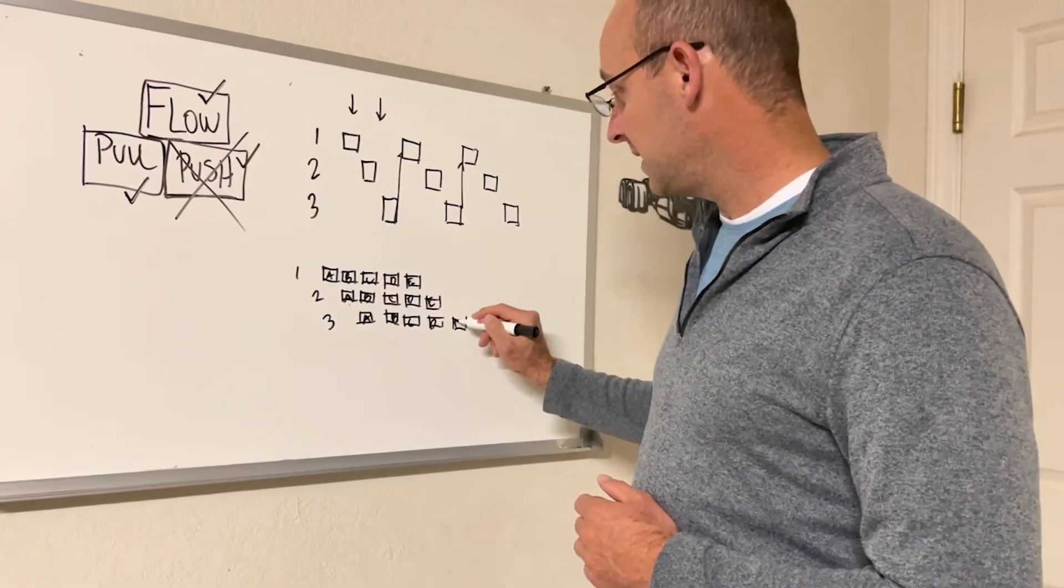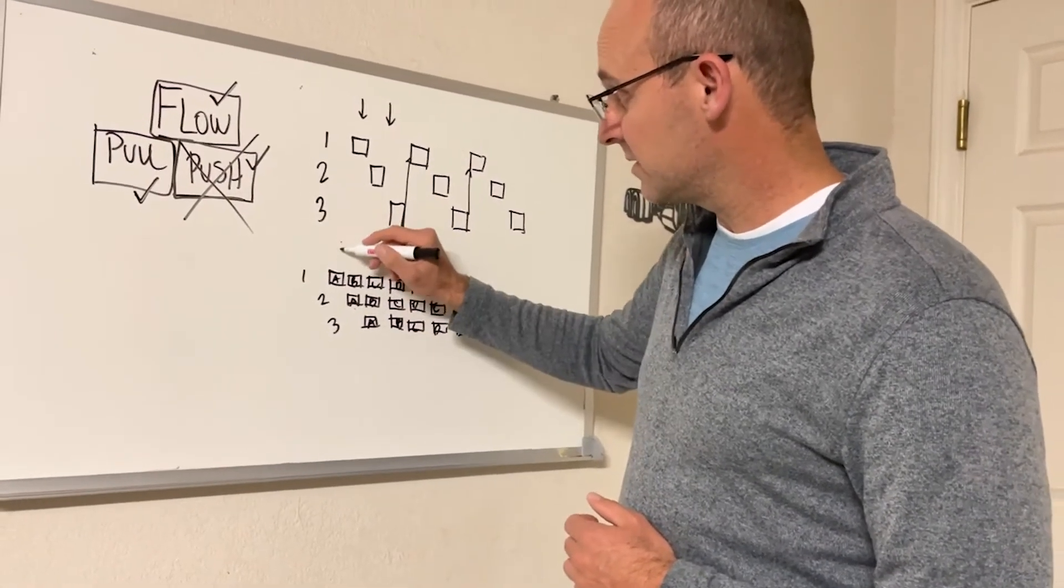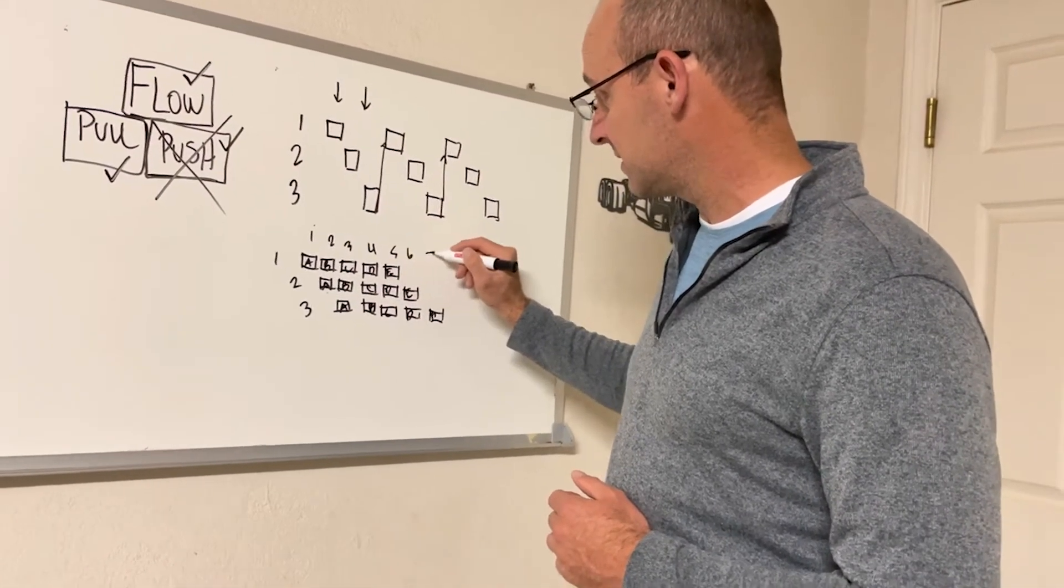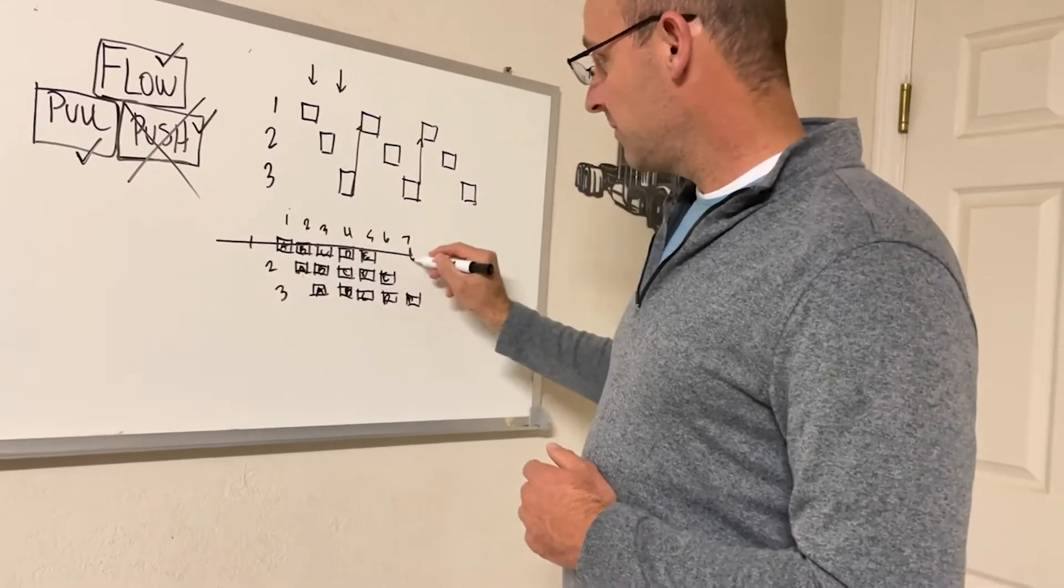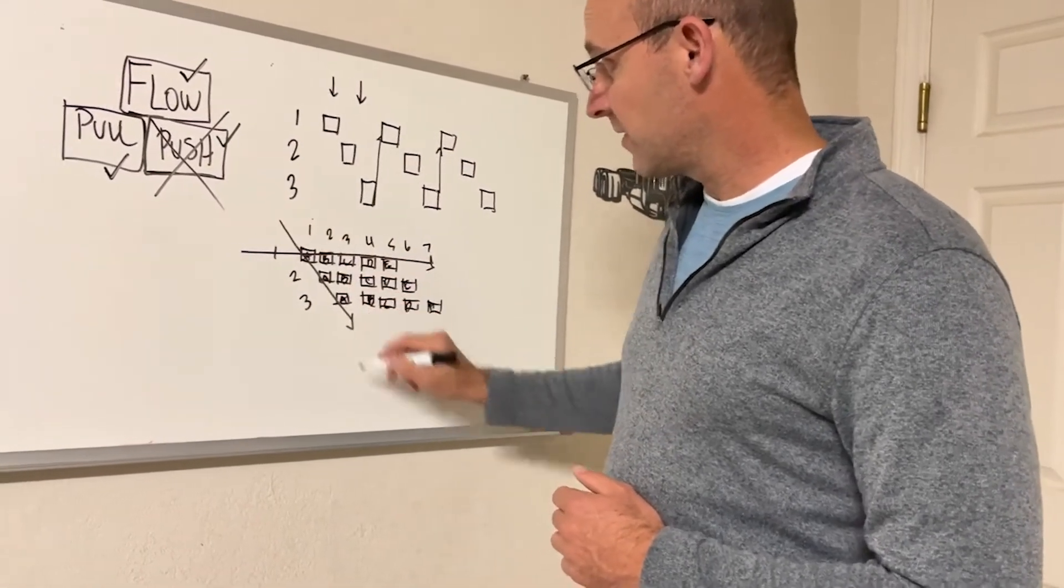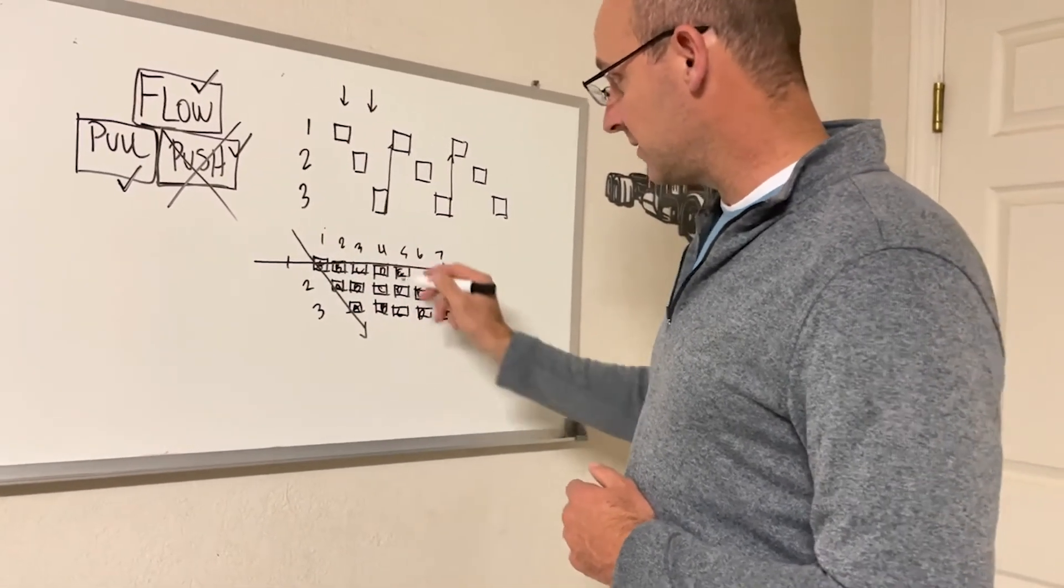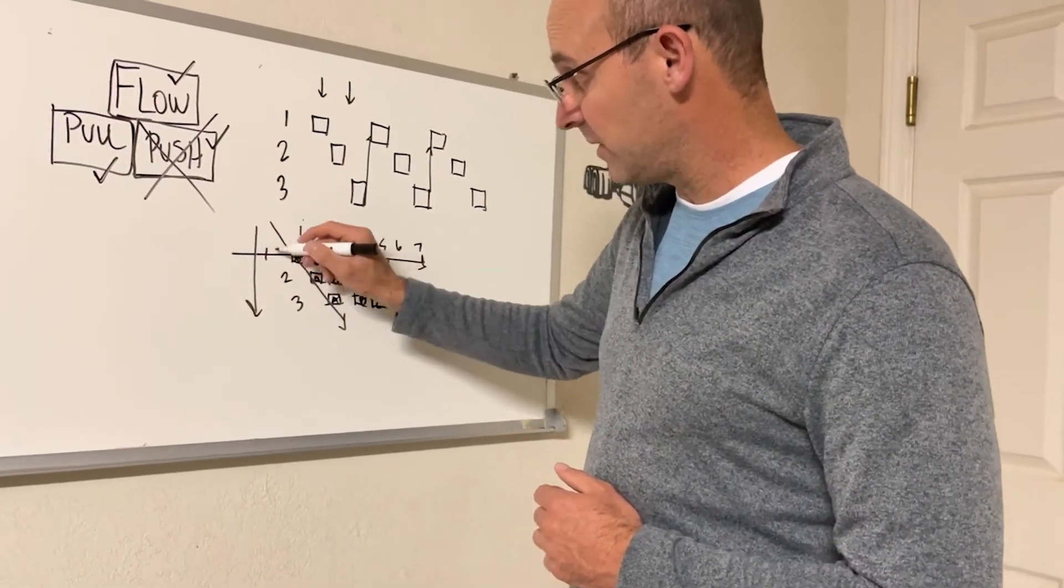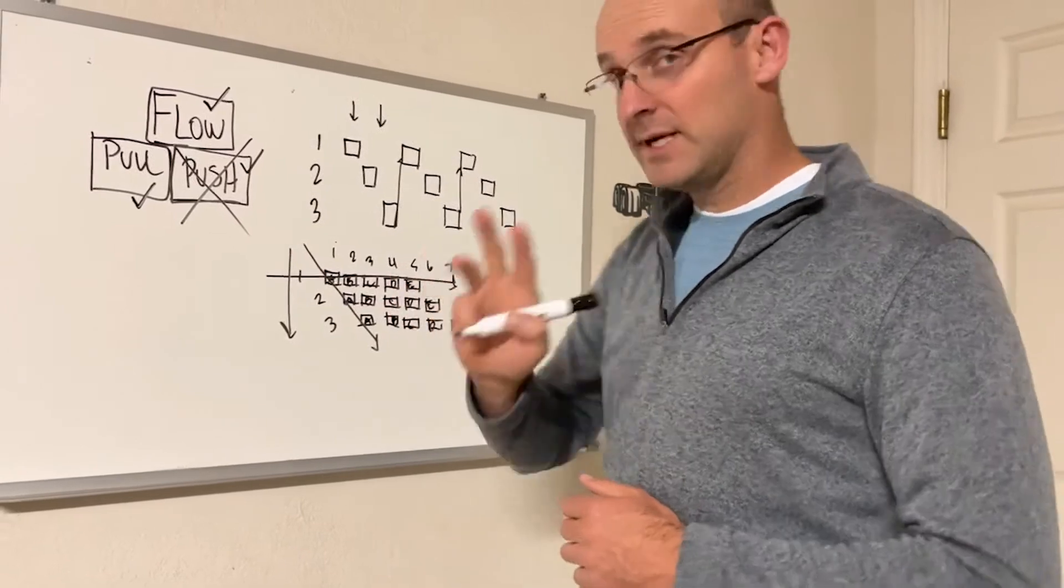A, B, C, D, and E. A, B, C, D, and E. And then these are the dates, so this is week one, two, three, four, five, six, seven. You can see the workflow, the trade flow for contractor A or B or C or D or E, and you can see the logistical flow. It goes from area one, two to three. That's three types of flow.